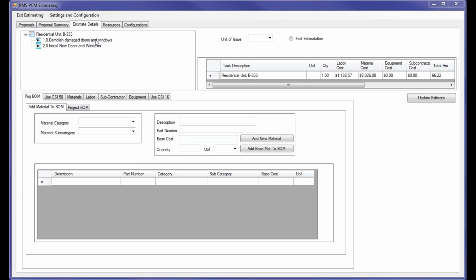One, we can individually and manually add the task, which will enter all the material costs, all the labor costs, or contractor costs and equipment costs manually while creating this task. The other 2 methods require subscription to an estimate data provider, and we have available the RMS database to add that information, or the CDOL Richardson database, depending on which is your type of construction work.